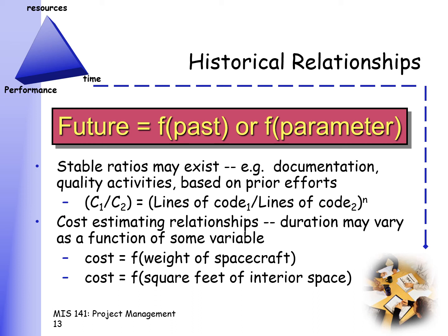Okay? Now, again, you're lucky if you have historical data. If you don't, then you're unlucky. This you can only get from the internet, and most historical relationships are usually at the phase level. So historical relationships will give you a very quick and dirty estimate of how long the whole project will take.